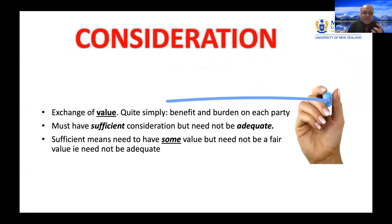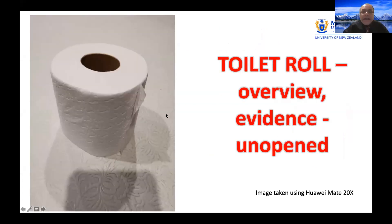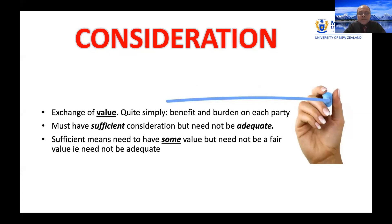On consideration: there must be some exchange of value. If there isn't, there's no consideration and no contract. If I undertake to build the KLCC for $100,000, that's fine — as long as I've undertaken to build and the client is happy. Consideration must be sufficient but need not be adequate. Sufficiency means there must be some value, but it doesn't have to be a fair or commensurate value. That's the legal principle within common law jurisdictions.